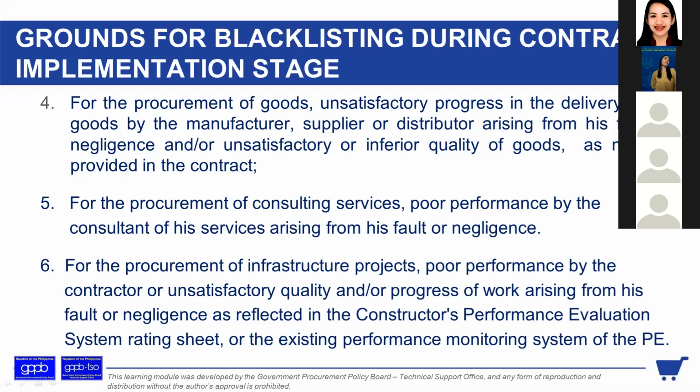So any example of this, for example, defective design resulting in substantial corrective works in design and or construction. Di maganda design niya, nagko-correct tuloy, so extra expense for the government. So failure to deliver critical outputs due to consultant's fault or negligence. Si consultant, di natin control ang time niya kasi hindi siya empleyado ha. Remember, consultants don't have government employer-employee relationship with us.